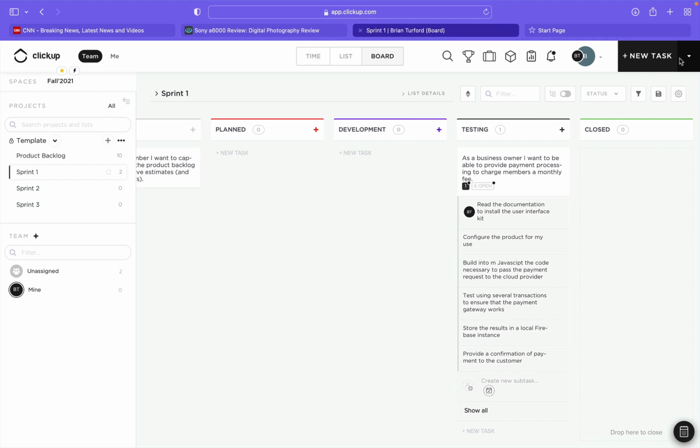So what you're going to do with a sprint retrospective is once you've got a plan produced and you've got everybody assigned, each individual on the team will go ahead and create a sprint retrospective. So in other words, a timesheet outlining all of their subtasks. And as they work through a project, they record information against it that then compares back to the original plan. And that's what we want to be able to see.